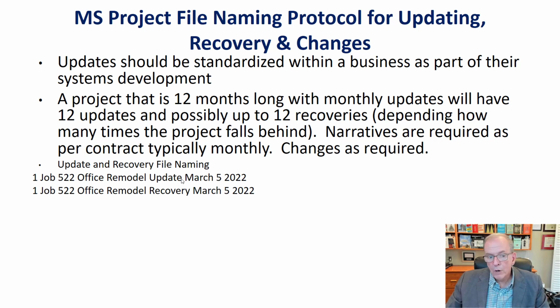All right, so you updated and you're behind schedule. Well, if you're behind schedule, now you should do a recovery. It's a revision of how you will get yourself back on track. So what are the ideas? What are the ways that you'll do this? And we've talked about this in other videos as well, and I'll provide you links in the description below, as I mentioned. But the only thing we're changing here is we're going File, Save As, and changing this one word from update to recovery. Everything else stays the same. Pretty easy, right? Easy to do.